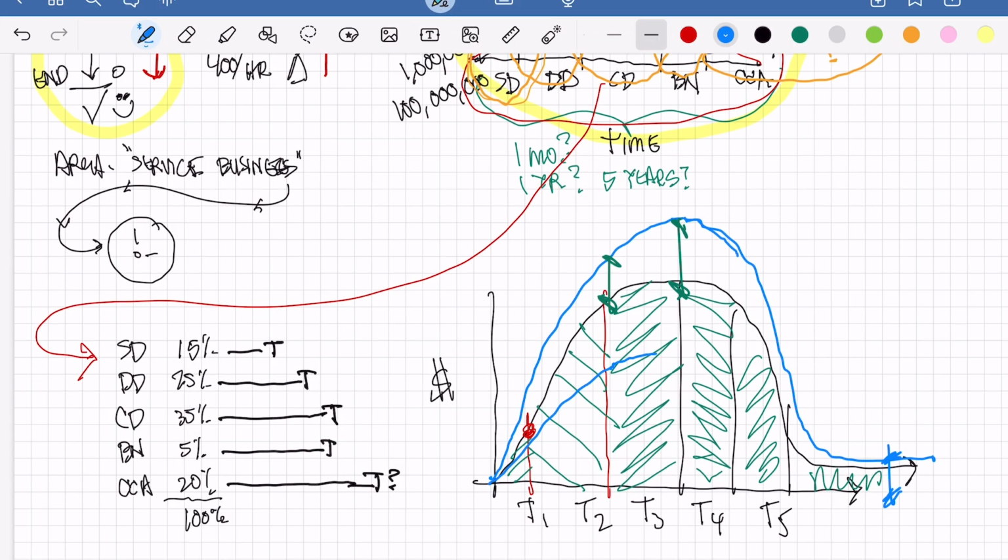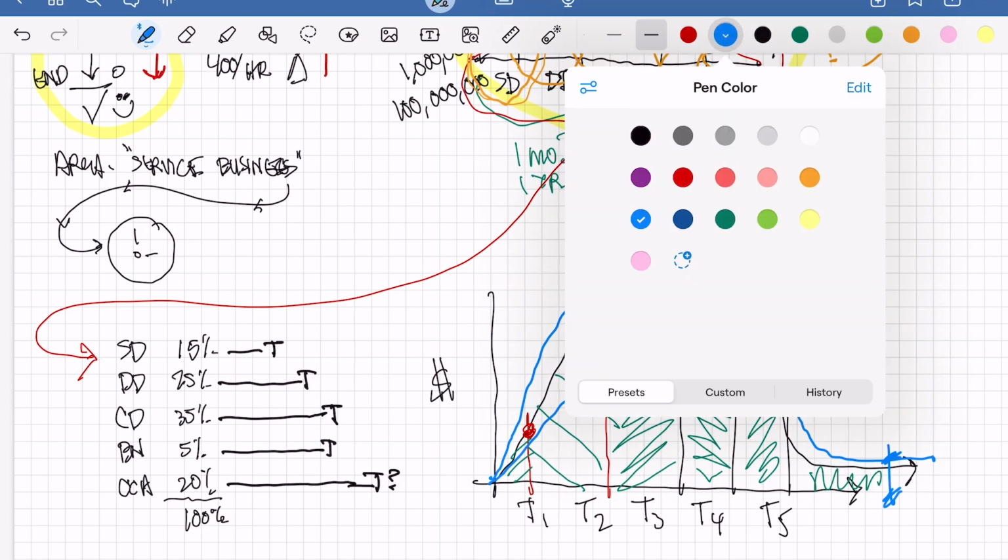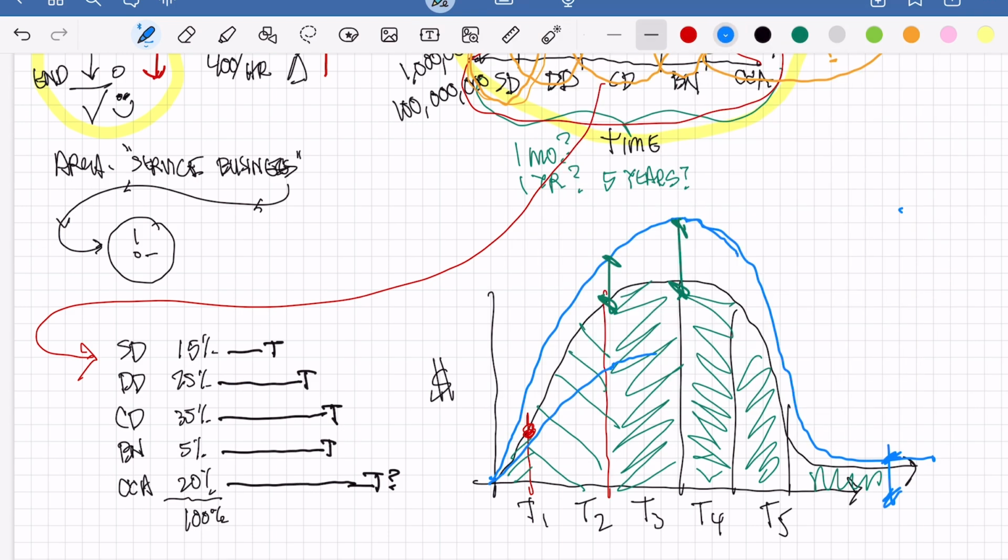1, our documents weren't that great. 2, the contractor's not that great. 3, unforeseen conditions, which if that's a legit reason, you can actually usually get more fees for that for the client if you put together the right kind of idea of why it happened. But anytime there's a delta between actual versus projected, and again, these are 2 versions of that delta, you've got some work to do. You've got some work to do to rectify any one of those things.